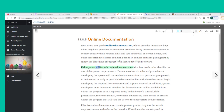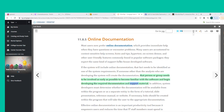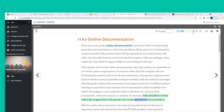If the system will include online documentation, the FAQ needs to be identified as one of the system requirements. If someone other than the analyst developing the system will create the documentation, that person or group needs to be involved as early as possible. System developers must also determine whether the documentation will be available from within the program or as a separate entity in the form of a tutorial, slide presentation, reference manual, or website, and create links within the program to the appropriate documentation.